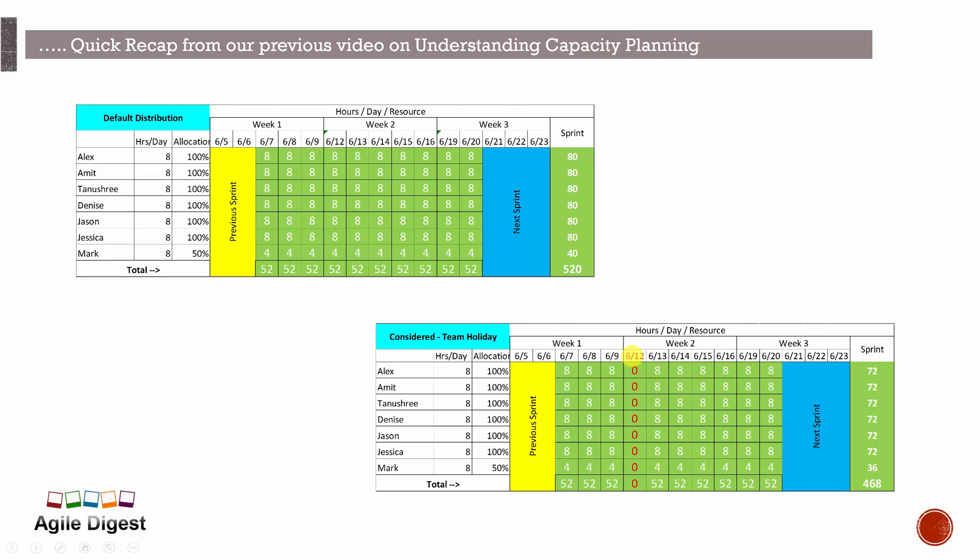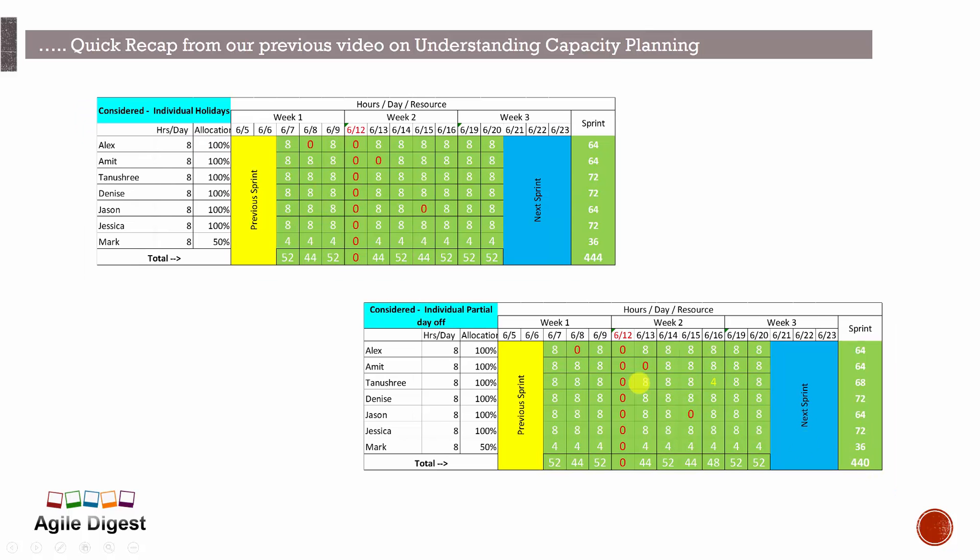Assuming 12th of June is a holiday, so our capacity will be reduced to 72. Now if we calculate the individual holidays, let's assume Alex is zero on that day, which means day off. Amit is on 13th, a day off, and Jeshan zero here is day off on 15th, and Tanushri here I am taking a partial day off.